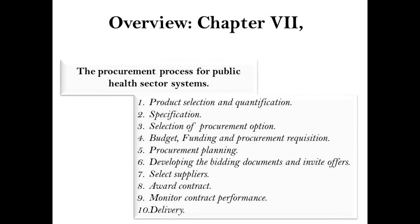Step 6: Developing the Bidding Documents and Invite Offers. Step 7: Select Suppliers. Step 8: Award Contract. Step 9: Monitor Contract Performance. Step 10: Delivery.